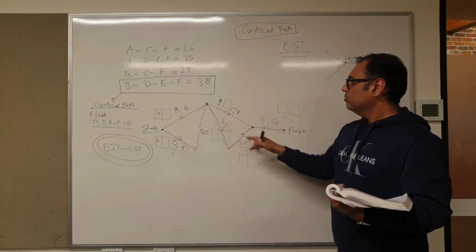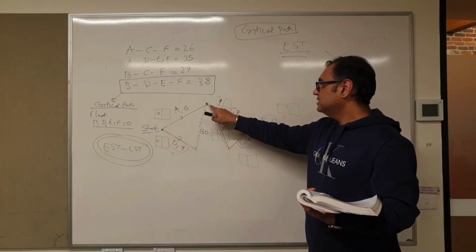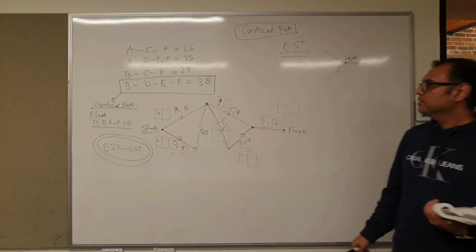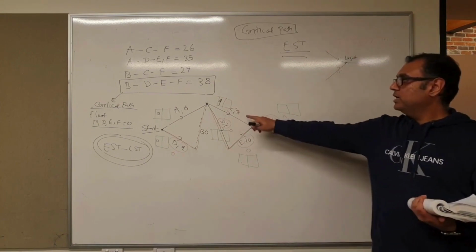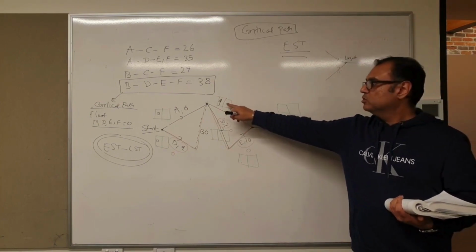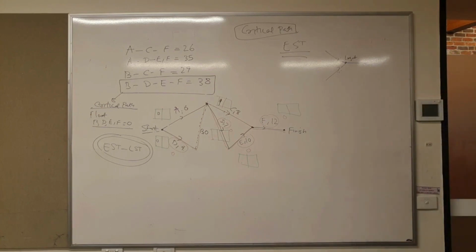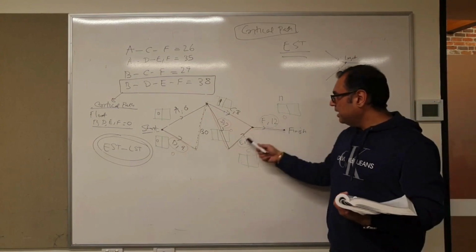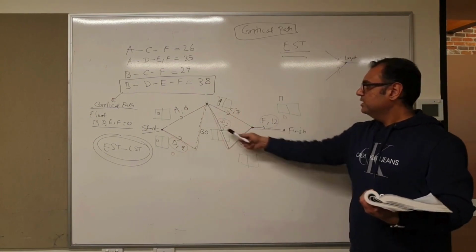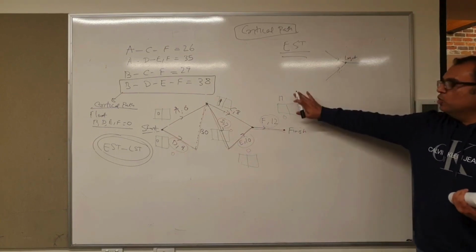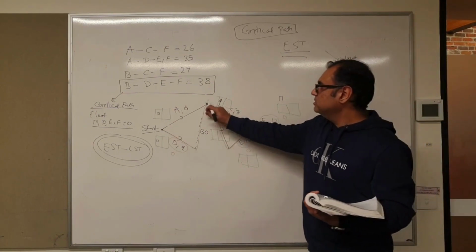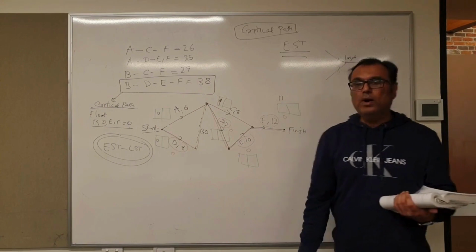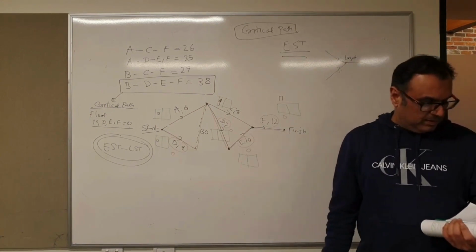Now from C, you went to F. C to F, you took another 8 minutes. So what is 9 plus 8? 17. So let's hold 17 here and see what's going to go into the box, because there's another path to F which is via D and E. Let's go from C to E via D. Now how much is that?